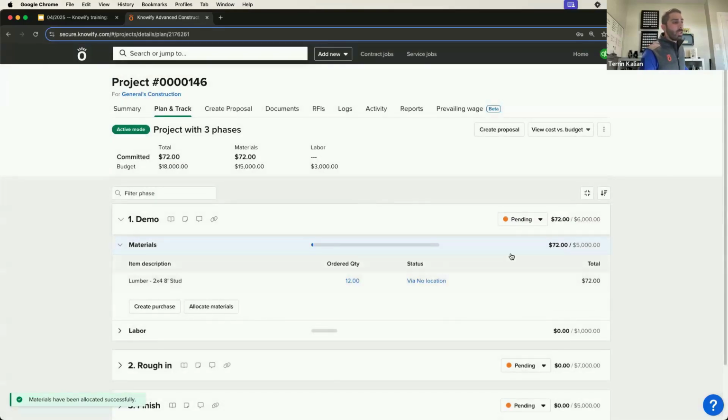Now, I mentioned earlier that this isn't really a vendor cost, especially when we don't have an inventory location. This is much simpler than having a vendor cost. But the reason I bring it up in this webinar is realistically, these studs came from somewhere, the materials came from somewhere, and it's probably from either an old job site or from my inventory. Point is, I had to buy it from a vendor at some point. So you can think of your material allocations when it comes to vendor costs as taking a vendor cost from the past and using it presently on a job.